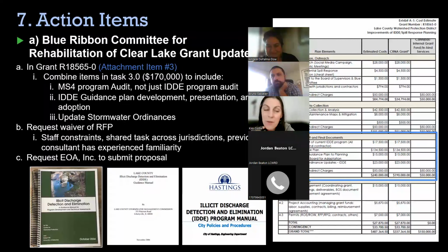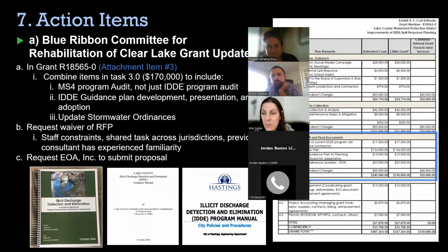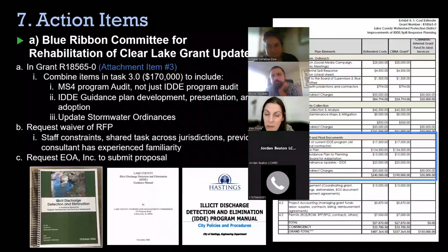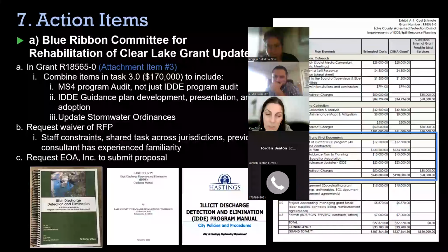Thank you. I think what is being described is basically a request for quote, which is a pretty typical process for projects with a lesser amount of money. But I think it's a creative way to give us the kind of information we would get if we wanted to contrast, as has already been said, while keeping sight of the fact that we want to be nimble and capture this grant if we can.